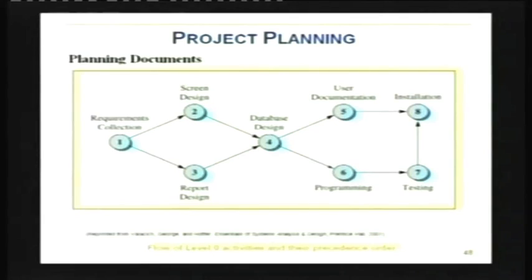The part where we take off today is what you see in the slide. In a couple of minutes, you'll see that we have a sequence of tasks. This is to achieve a particular mission in our simple language, which has a certain scope. This project has a certain scope, and when it's broken down into deliverables and tasks to be done, you end up with a list of tasks, and this is called basically the work breakdown structure, WBS.